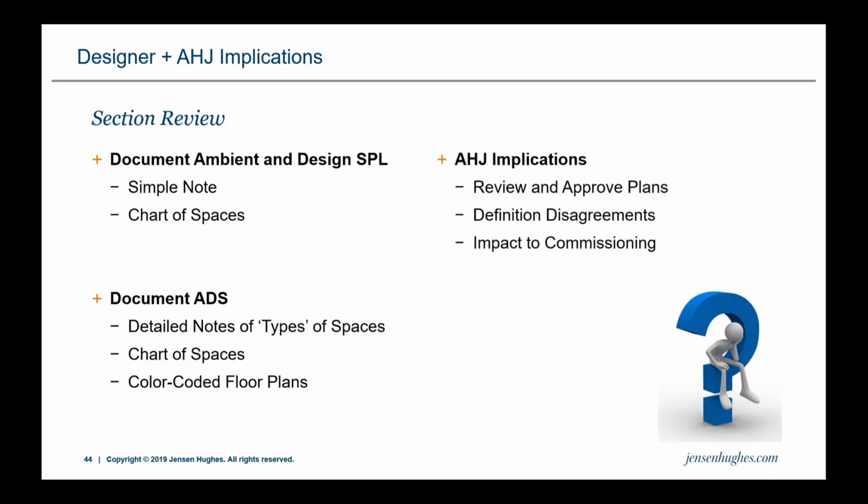But keep in mind, whatever you do, it has implications with the AHJ. They have to be able to review and approve our plans. If there are definition disagreements, it's going to have an impact on commissioning, so we have to have that communication with them.